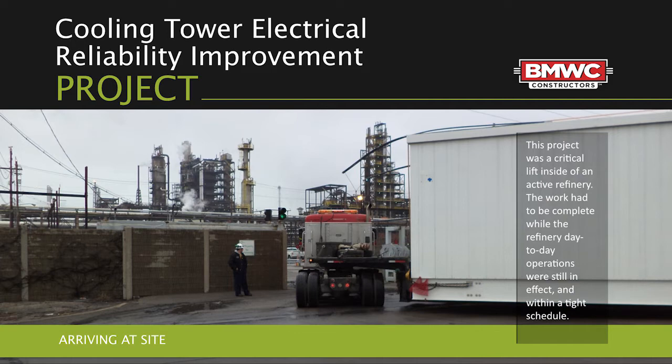They would have had to have one fabricated, which you would have had to have engineered, fabricated, certified, load tested, and then delivered to site within that 3 to 4 week period, which did not seem likely at the time. Right. So you get the job, and then you have a set of goals you have to achieve. Talk a little bit about those.